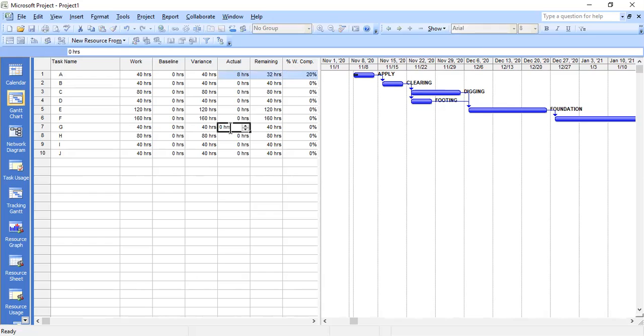So 20% for this activity. You can see this person is going to work actually 32 hours. And also you can see the work is 20% done, as you can see from the diagram here. So this 20%, I'm saying I've done 20% on 5. So if you feel that you are done with the second activity 100%, you successfully finish it, you put 100%, then you discover that this is done 100%, and the remaining hours are 0 because you have covered everything, right?